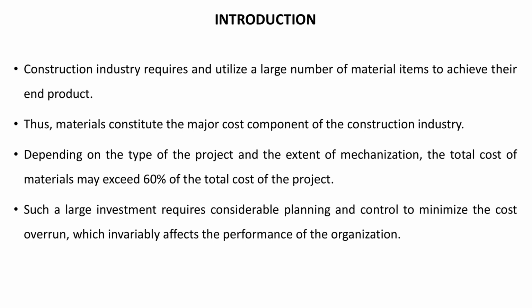Depending upon the type of project and the extent of mechanization, the total cost of the materials may exceed 60% of the total cost of the project. Such a large investment requires considerable planning and control to minimize the cost overrun, which invariably affects the performance of the organization.